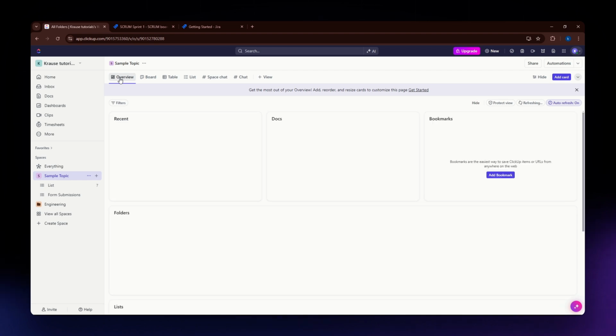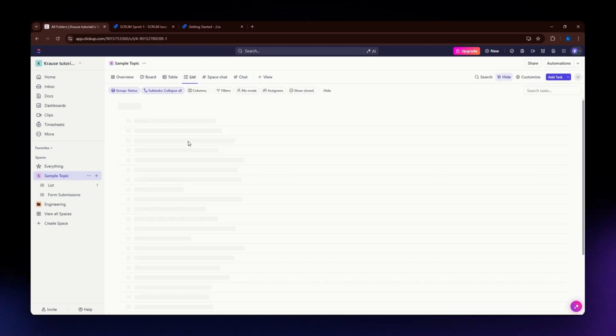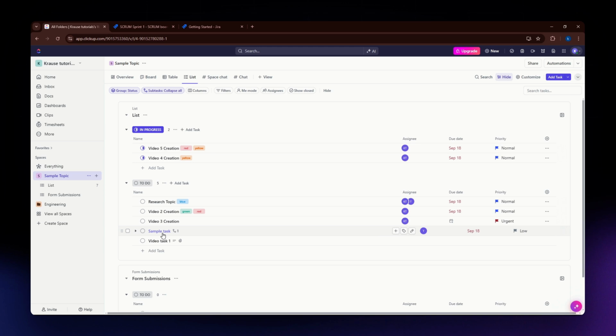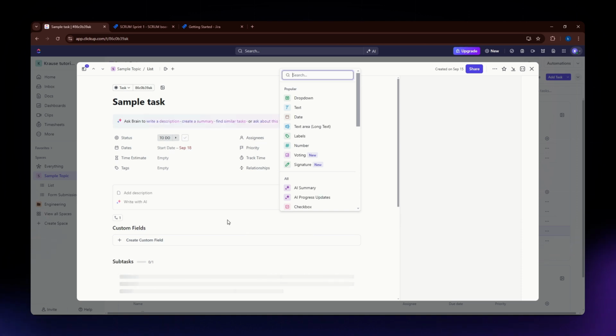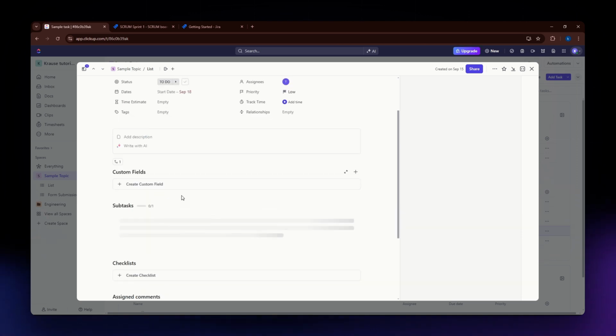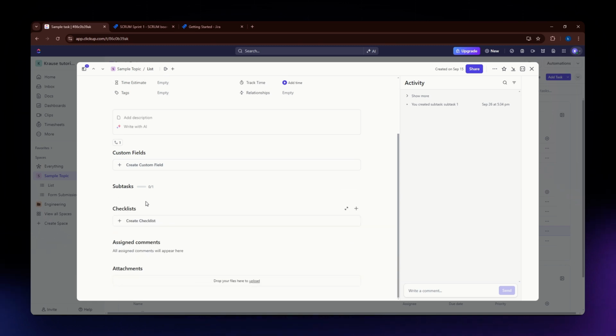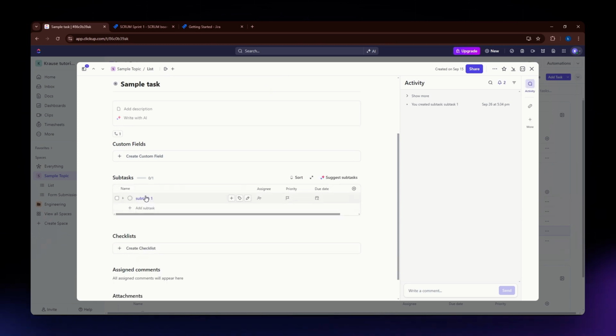What is also one of the coolest features of ClickUp is the task hierarchy and the dependencies. You can break down projects into tasks and subtasks. I'm going to show you what that will look like. I have here a sample task. Once I click onto this one, and I have added, for example, a subtask, I'll just need to click onto it, and then on the section right here, I'll be able to locate my subtask. And not only that, you can also set task dependencies and create recurring tasks. This helps keep even the most complex project manageable.